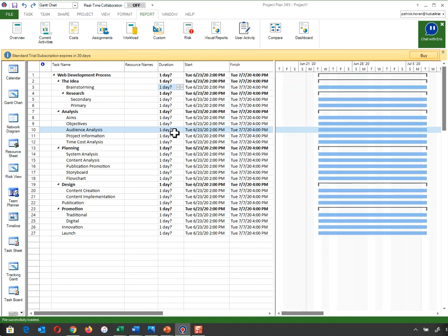And all of our tasks down along here are going to be relatively short tasks. So we're not going to add 1 day or 1 week or 1 month or 1 year to them. Normally we're going to add hours here, or minutes. And what we do is for 1 minute we put in 1 M. For 1 hour we put in 1 H. If I wanted to put in 60 M for 60 minutes or 1 hour, it's exactly the same.